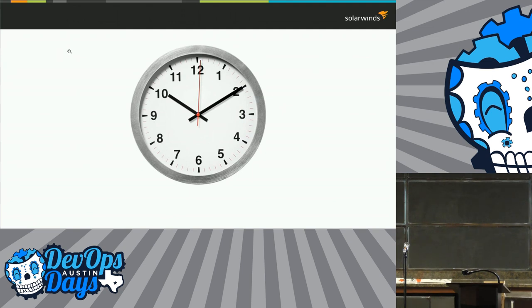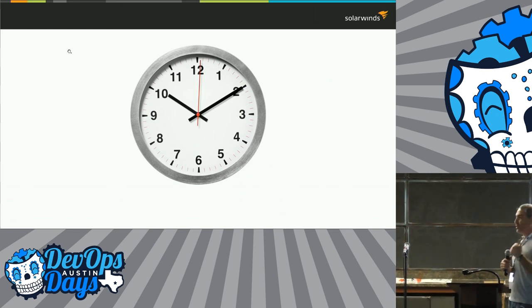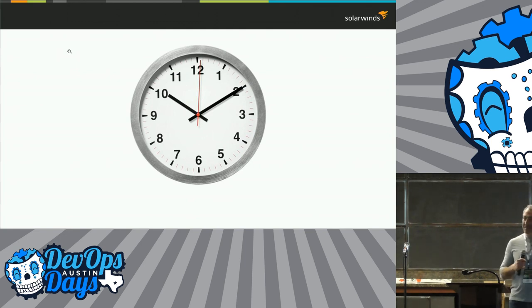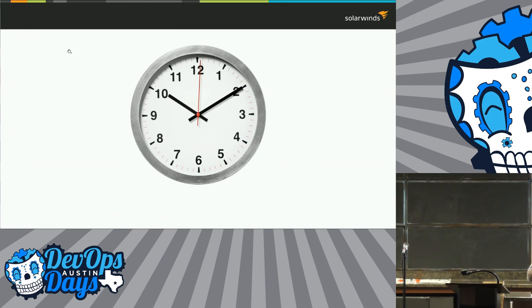I say average velocity because please don't get hung up if your velocity goes from 24 to 27 and back to 25. Oh my God, we have to have a retrospective to find out why. Forget it, that's ridiculous. But if I can know what my average velocity is, I can tell you when something's going to be delivered. That's the most powerful thing we can do. That's how we're actually agile because we're looking at the time horizon that's really close to us, not 14 months out. We're saying this is when stuff's going to happen. And that's why we're doing Agile.